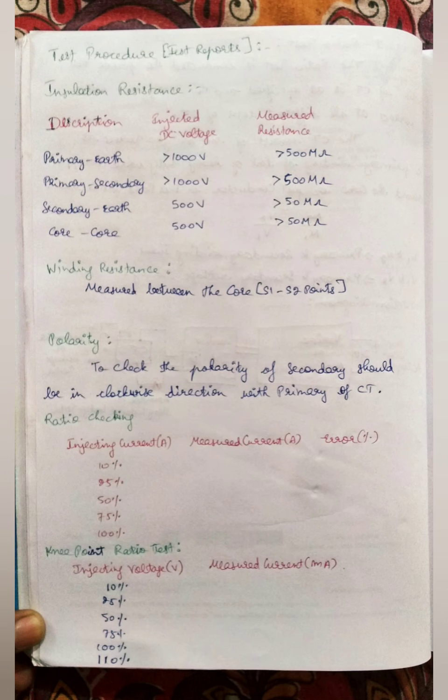Next we will go with the test reports, and what all the test reports we should mention for your CT. Normally, as I informed, the test procedures are insulation resistance test, winding resistance, polarity, ratio test, and knee point test. So this is the basic report preparation. In such a way, we should prepare the reports for your testing.